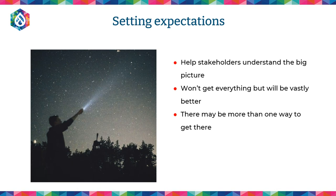Yeah, I just wanted to add, not solutioning in the RFP is really critical, because often we'll see an RFP and they've already picked technologies and started to recommend approaches to execution, which, I can see why people want to do that. They want a very specific response and quote to what they're thinking ahead of time, but when you're going out to a collection of solution providers, you need to give them some freedom to recommend and provide expertise.